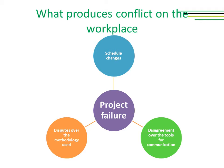As for scope changes, imagine you have put three weeks into building a plan to install network infrastructure in a new office building, then receive a scope change specifying you need to switch to a new type of equipment. Your first reaction may well be anger at the stakeholder, as you will have to redo all the work. As for schedule changes, crashing is a technique used to shorten the schedule duration for the least incremental cost by adding resources. In practice, crashing can mean overtime work, and absent support and planning, a crashing schedule change will trigger conflict.